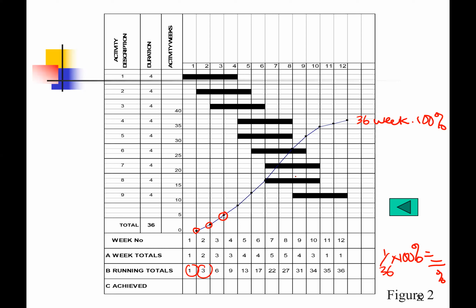Normally we would convert the vertical column into percentage, whereas the horizontal column remains as the project duration, or the timing of the project, so as not to be confused. We are using weeks here, and the horizontal is also weeks, and people get confused about which one we are referring to. The idea is for us to construct this S-curve, and this is what we call the plan.